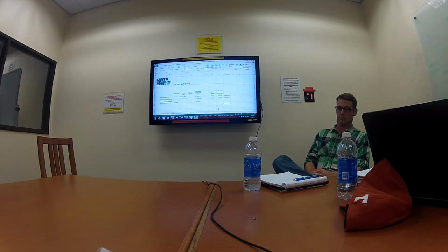A lot of teams get mixed up and they don't know how to weight the $380,000, so they might put that in one item or divide it. We've never weighted it. Yeah, or they take it and they're like, all right, we have 35 items, so we'll take $400,000 divided by 35, and we're going to put that much in each item. Well, if you do that, then yeah, it's spread throughout items, but the way that it's done in here, even though it's convoluted and not necessarily presented as clearly as it could be, it's done strategically. And if you're able to explain that strategy, it shows them that.